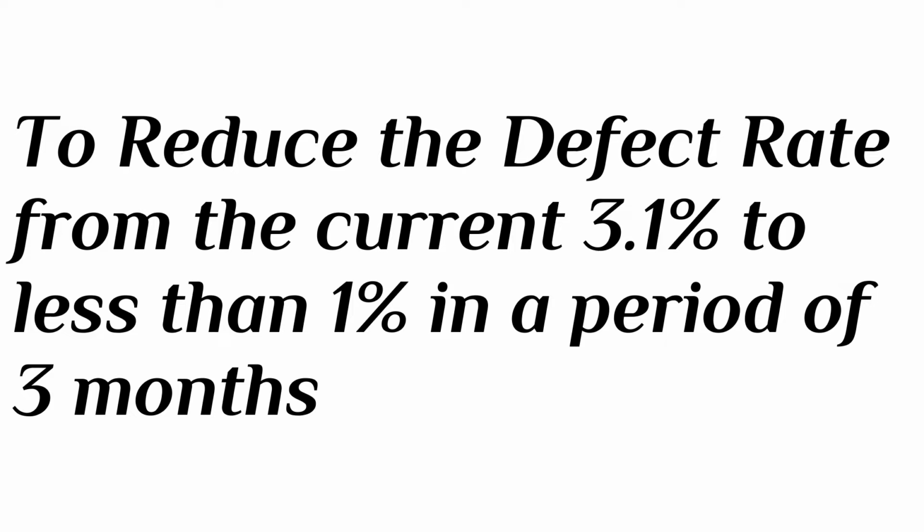If you are improving the production or you're reducing the defects or whatever, the thumb rule is 3 times the improvement from the current level. So that is basically what you have to write in a goal statement, where you are from at the moment and where you wish to reach. That's your goal, and it is practical.